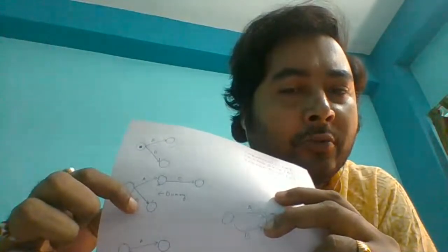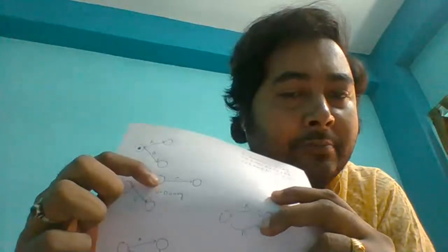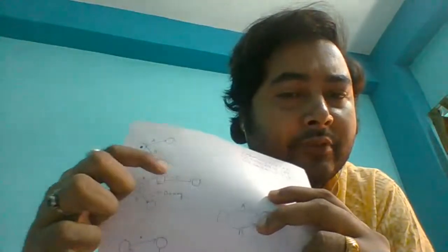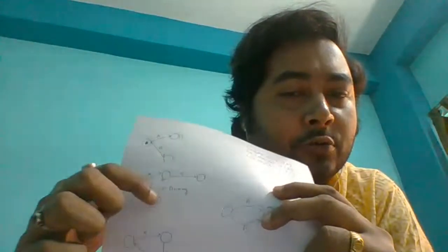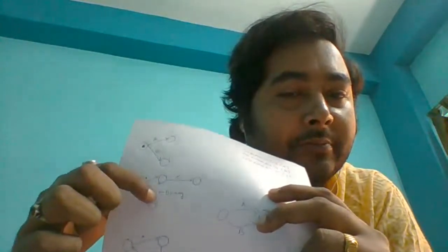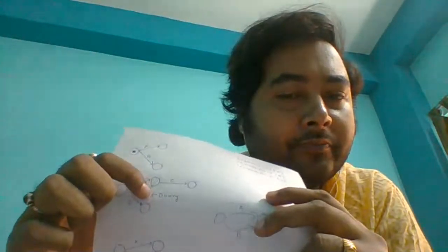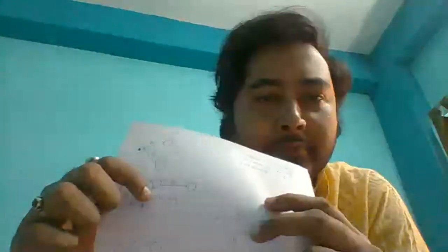Then how will you draw? You cannot just draw like this, B then C. Or you cannot just combine these two and then draw C. Then you have to use this dummy activity, which is represented by dotted lines. This is called a dummy activity, okay?